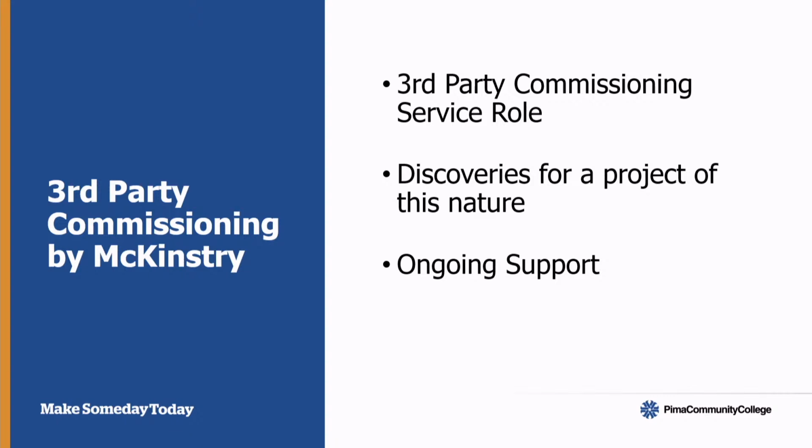That effort began in 2023 when McKinstry started reviewing documents and verifying the scope of work. They conducted field inspections and validated the controls programming as well. They also participated in college training reviews and facilitated issue resolution meetings with the vendor as well as college staff. Key discoveries during the commissioning report: they uncovered 313 total issues, and they were all categorized by priority.